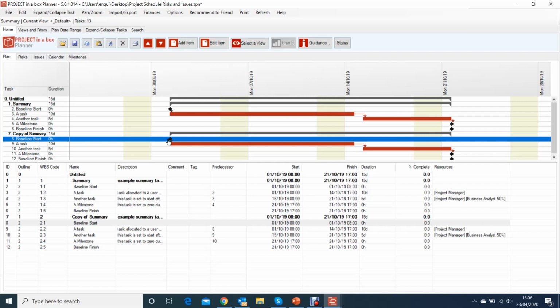If you've got a highly repetitive project, say the rollout of 5G, and you're doing the same thing in lots of different places, you might have a very much standardized project plan, a standard template with all the content in it, and all you do is create the next one, or copy the file, use it again, and just change the start dates and change who's allocated to the tasks. That's quite a common thing to do, rather than rebuilding the plans every time. So put the content in.